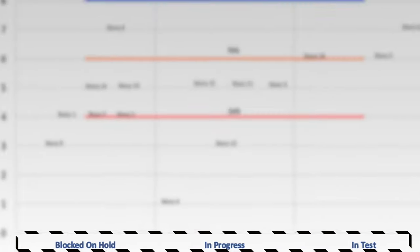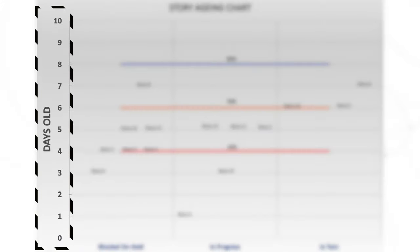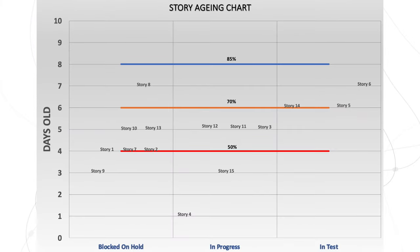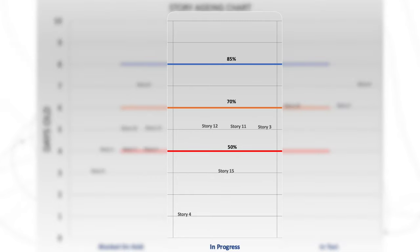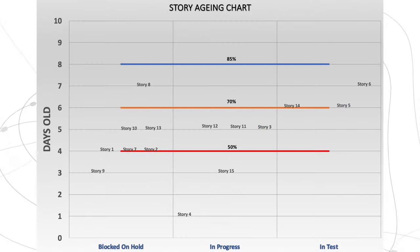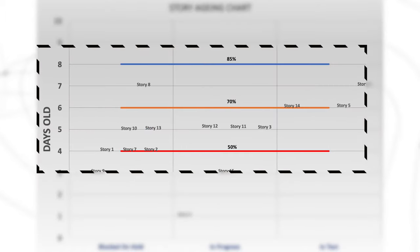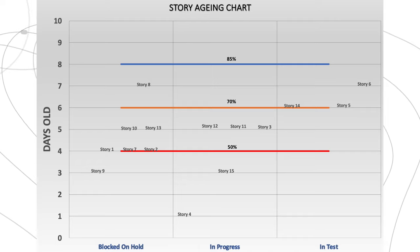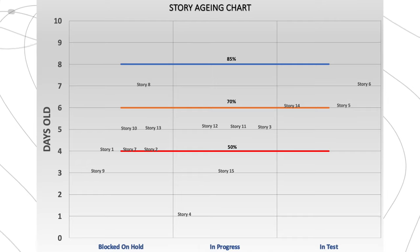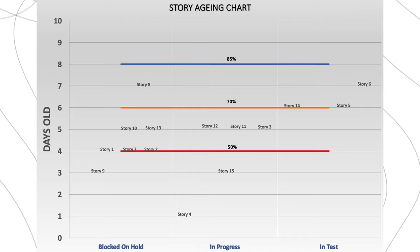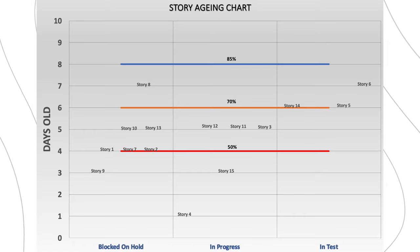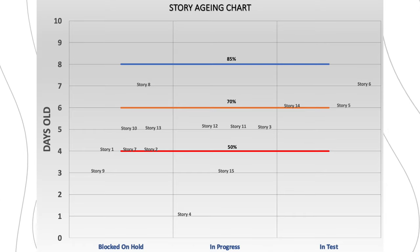There's a link in the description to a template so you can download it and have a play with your own data. Along the bottom you can see your board column names, and on the side the number of days old a story is. The story names are listed so you can read off to the left how old they are, and they're placed in their current workflow state. You're going to mark your percentiles horizontally across the board: 50%, 70%, and lastly 85%. Where do these percentile lines come from? You get this data from your cycle times for single items that you've previously calculated — check the videos in the description below for more information on how to do this.